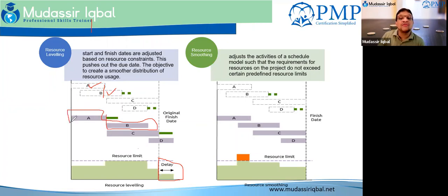Resource leveling often causes the original critical path to change. It creates a leveling of the resources, and the critical path through the project schedule will change. Resource leveling may allow long work hours to complete the project. It may put a burden on the team, who might be working overtime, weekends or evenings. In the case of resource smoothing, resources are delayed within their free and total float.